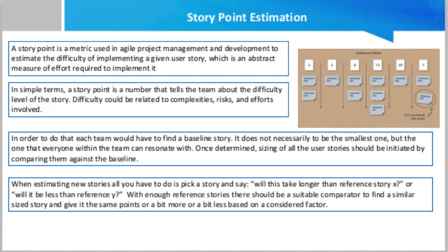Fibonacci number for story point. When the development team conducts an estimation, it is recommended to abandon the traditional human days or man days assessment method, using instead the story point with the Fibonacci numbers, which are 1, 2, 3, 5, 8, 13, 21, to estimate the story point.